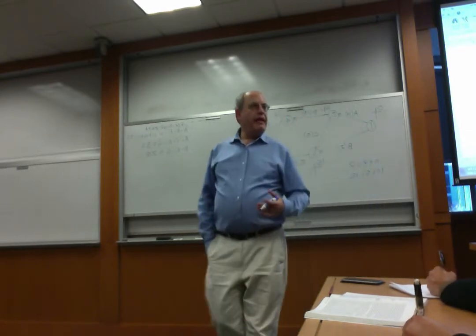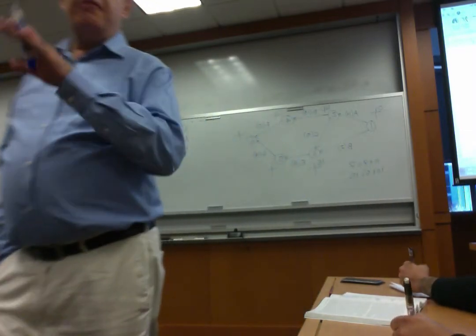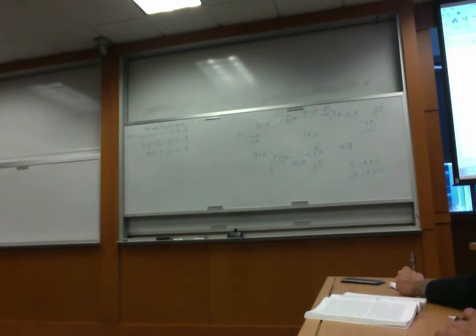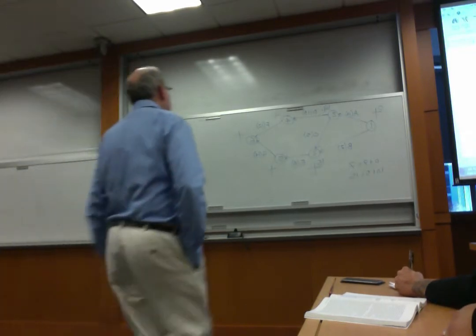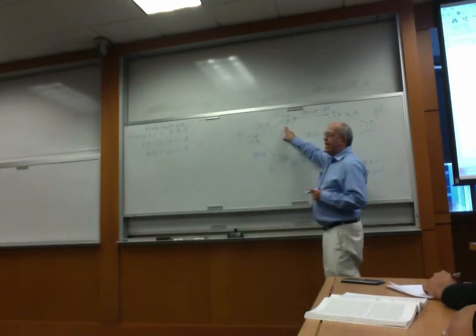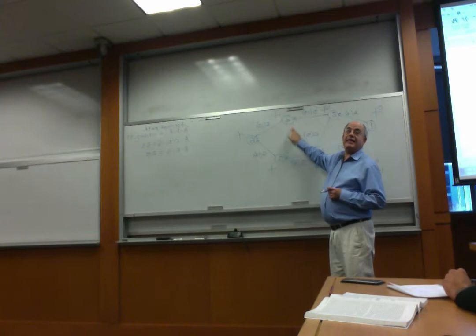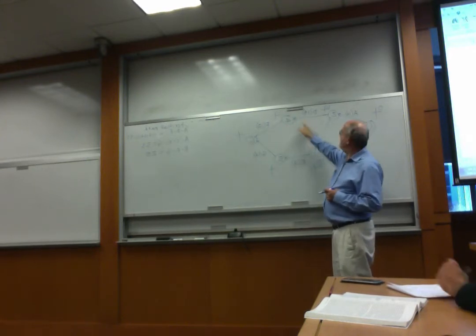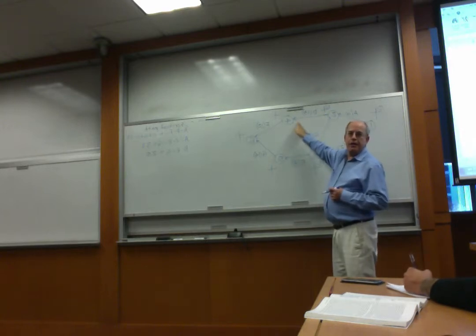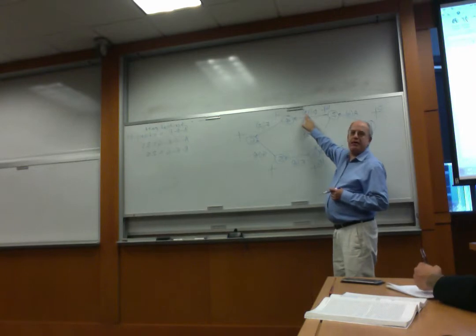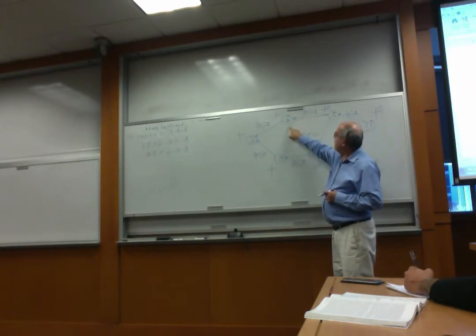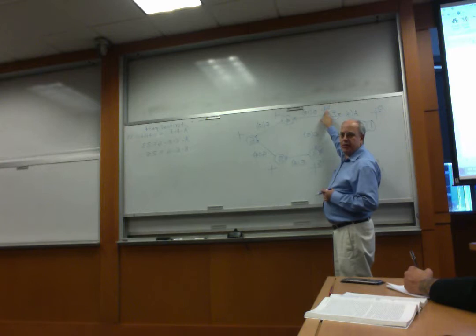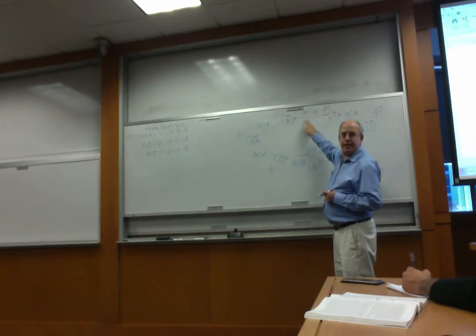All right, so now I'm halfway through going forward. I'm already at 3. So I have to go to 4, and then 5, and finally 6. So next point is 4. How long is it going to take me to get to 4 going forward? Again, look at the graph. Is there a link between 4 and a previous point? Yes, there is a link between 2 and 4. And what is the link? D. What is the length of D? 13. So how long is it going to take to get there from 2? The value at 2 is 10, plus 13, 23.